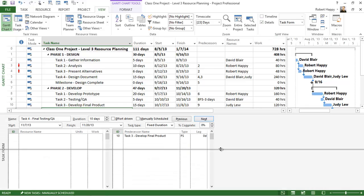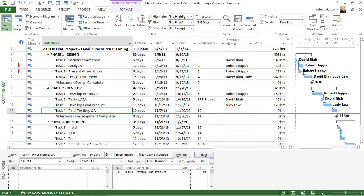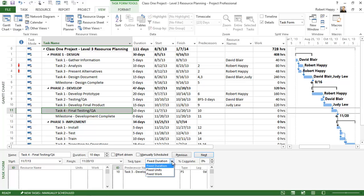Just adjust this down a little bit and I'm going to take this testing QA and move it from fixed duration to fixed work.